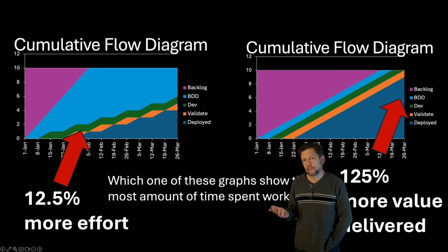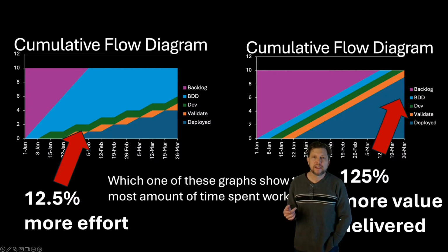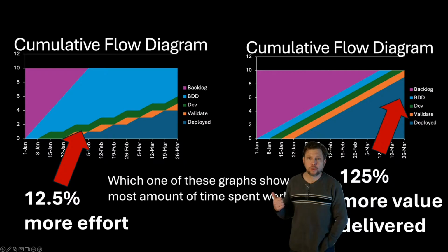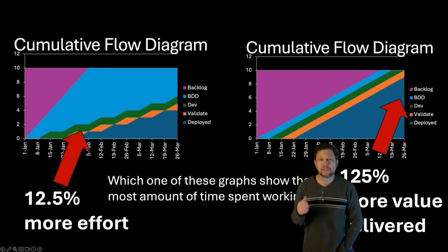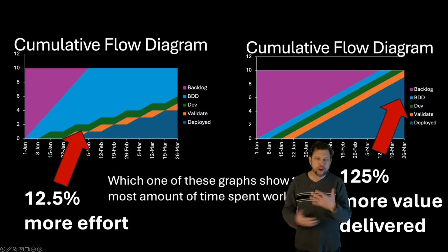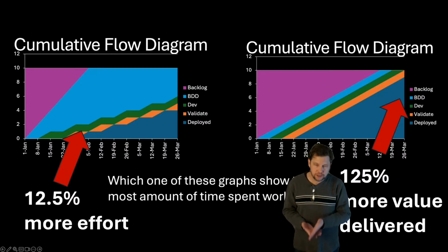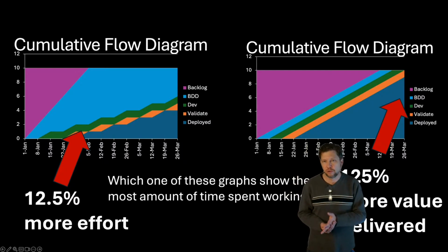If it's not a cross-functional team and these are actually different people, what I would start doing is looking and saying, are there other teams that are in the opposite situation? What if we find another team that needs more, where they're starved for work, where the thing that's slowing them down is they don't have BDD capacity to deliver stuff. And maybe there's a possibility of training people or integrating some things, because what we need to do is stop producing BDD scenarios so quickly, and start increasing our capacity to do dev work.